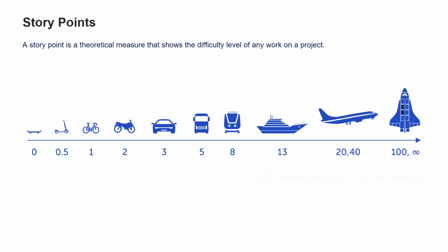So when some kind of a task is given, if we say that the difficulty level or the story point is 3 for that specific task, that means if a single story point is equal to 4 hours, it will take around 12 hours of time to complete that task. That's the basic understanding. This is not a hard value, like the story point should be equal to 2 hours or 4 hours. It depends on the company or the organization that you work in, and based on that, this can be changed.